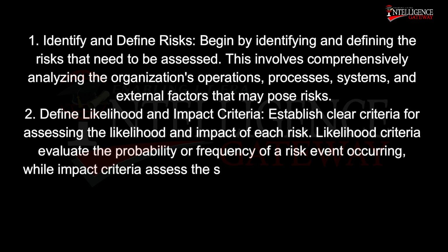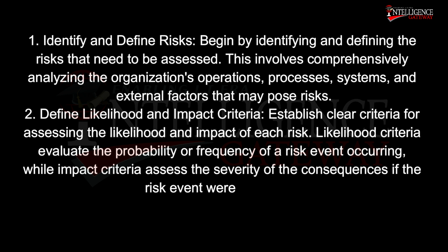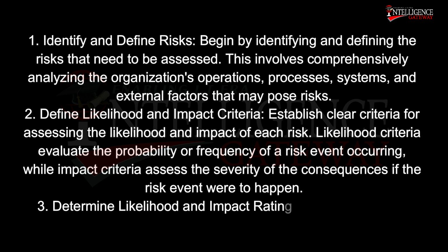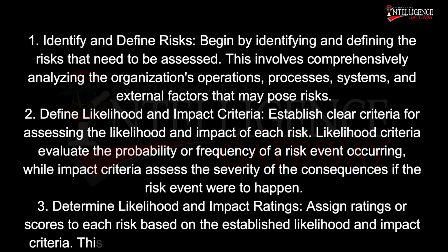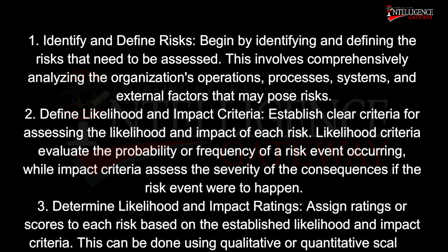3. Determine likelihood and impact ratings. Assign ratings or scores to each risk based on the established likelihood and impact criteria. This can be done using qualitative or quantitative scales. For example, likelihood ratings could be low, medium, or high, while impact ratings could be negligible, moderate, or severe.